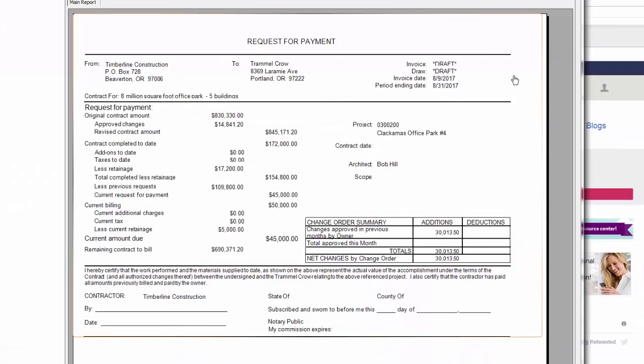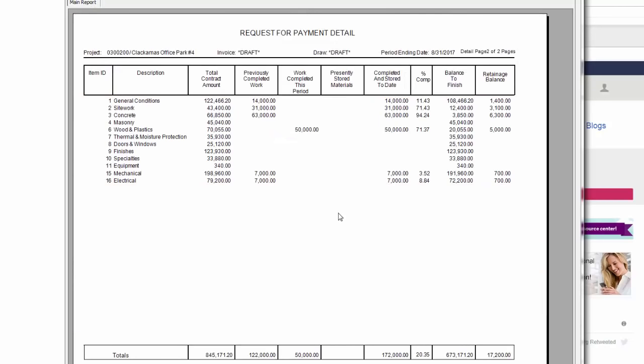As you can see, the invoice looks very similar to the AIA G702 and G703 form. Here I have my summary form at the top that gives my contract totals with changes, what I've billed and received. And then on the second page, I have my schedule of values.